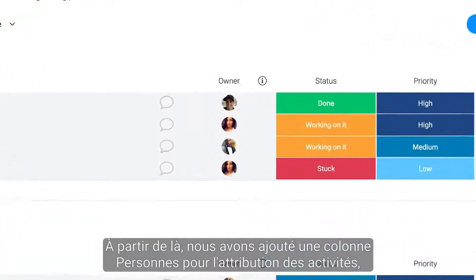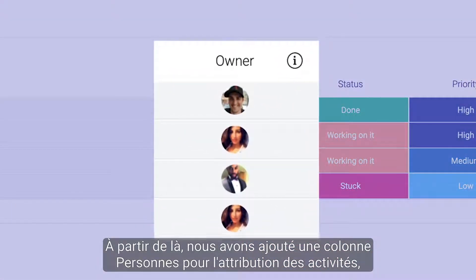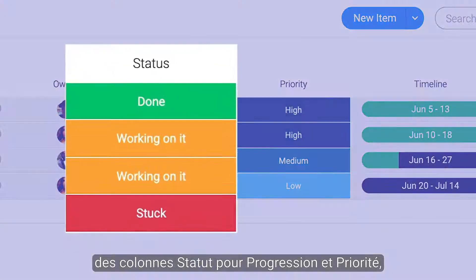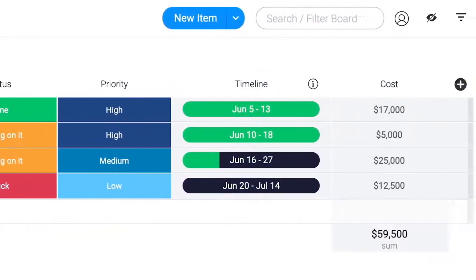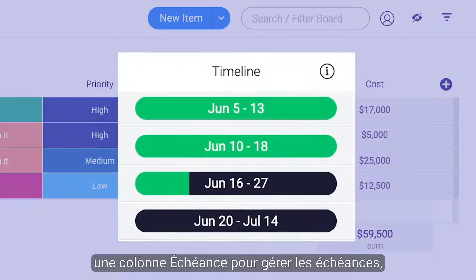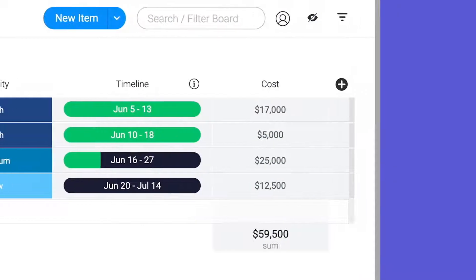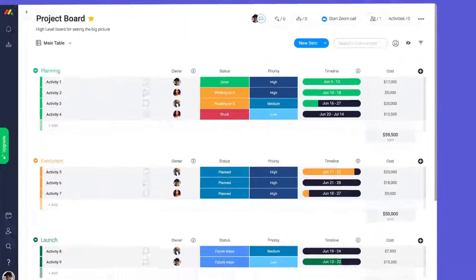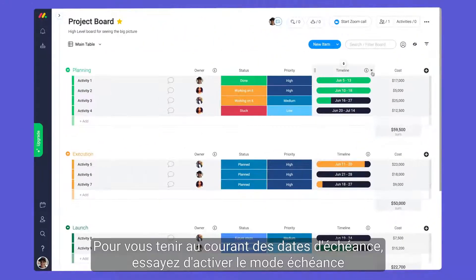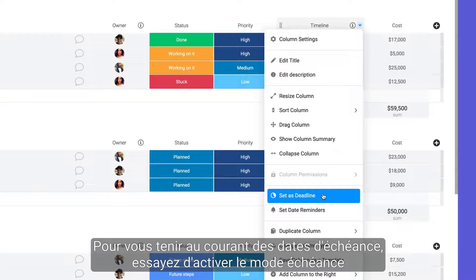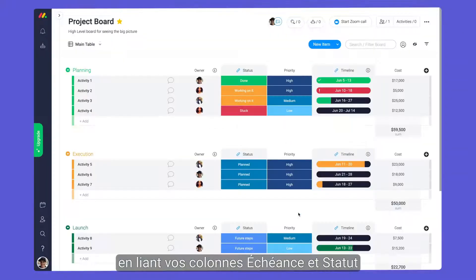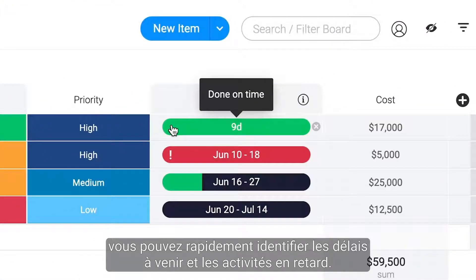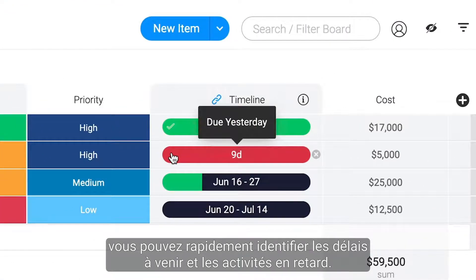From there, we've added a people column for assigning activities, status columns for progress and priority, a timeline column to manage deadlines, and a numbers column for tracking expenses. To stay on top of due dates, try enabling deadline mode. By linking your timeline and status columns, you can quickly identify upcoming deadlines and overdue activities.